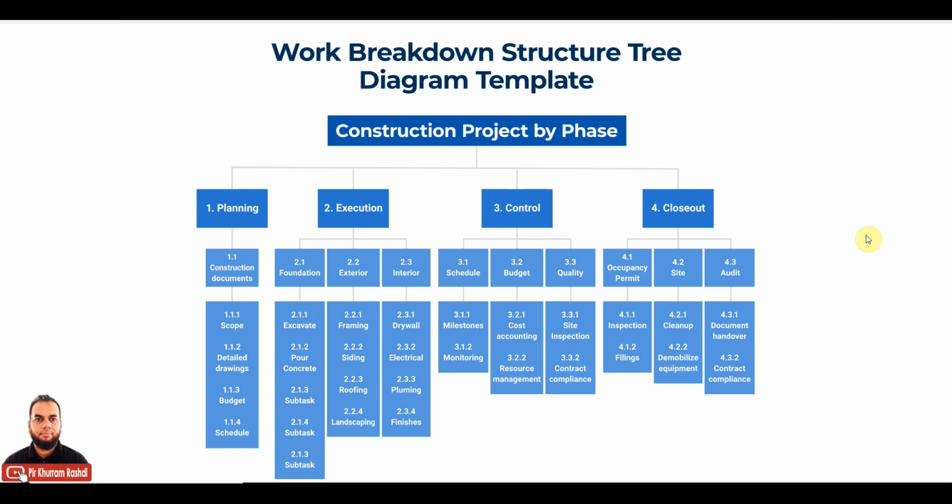The degree of detail in a work breakdown structure normally depends upon the level of accuracy required. In certain industries there is a very low tolerance of slippage in schedule or cost. Cost definitely increases when, at the last moment, more tasks are incorporated or changes are required.